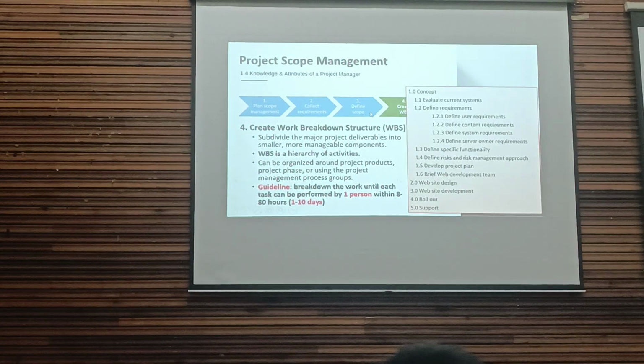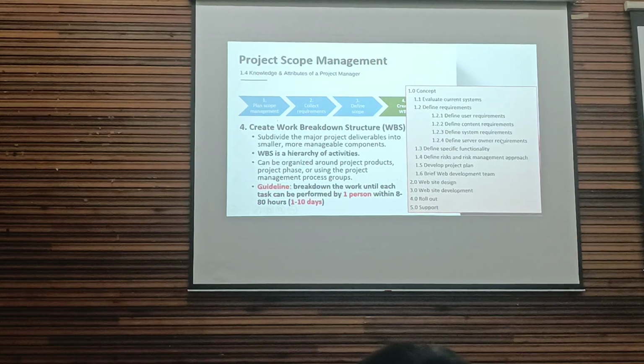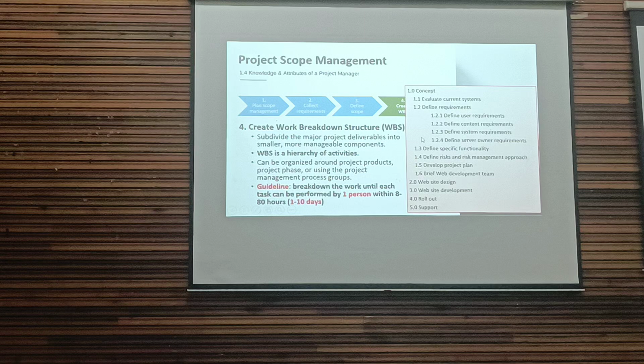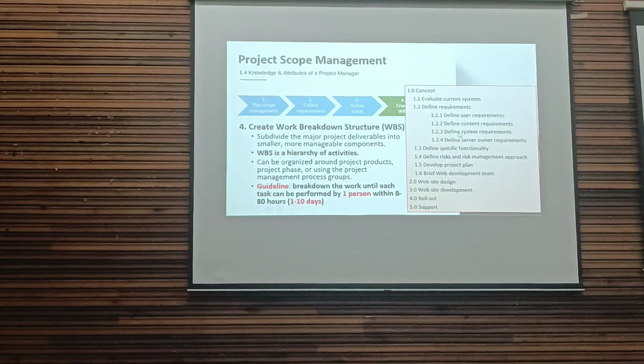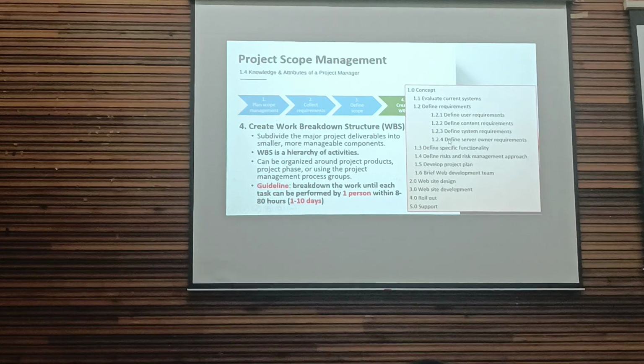So the next step is create work breakdown structure. A work breakdown structure is a hierarchy of activities. List down what the work is and group them appropriately. Show the hierarchy.